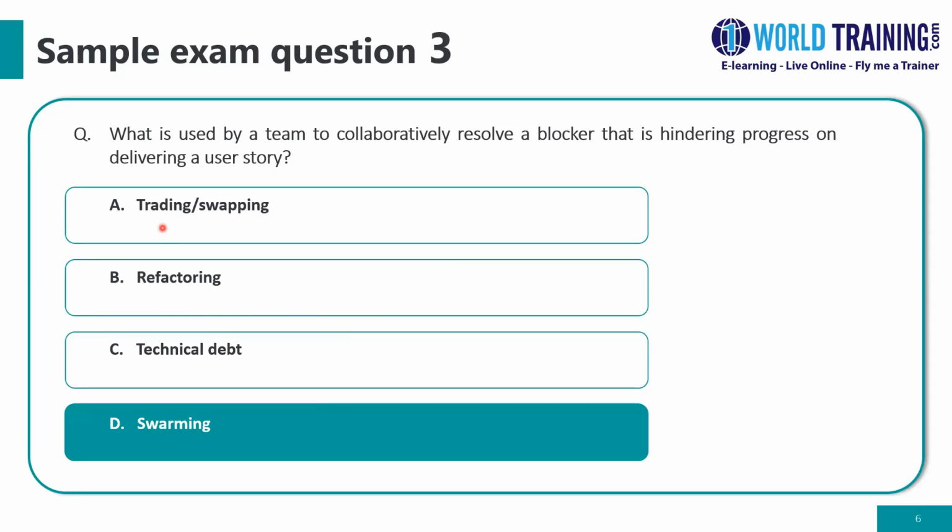And therefore, as the team has already committed to deliver some items or some user stories, the best they can do is to take out the one which is probably less priority now and bring in the other one which is higher priority. But then the effort should be very similar. If it is of a larger effort, then it is not achievable in that iteration. If it's much lesser effort, then there'll still be some more space left in the iteration, so they could probably absorb something more as well.